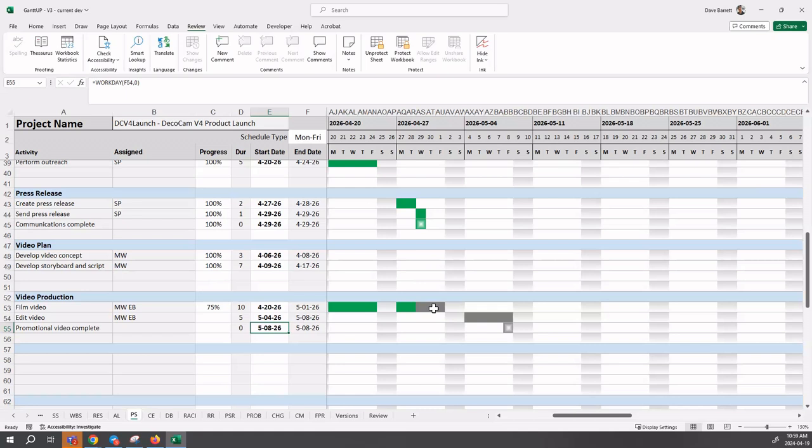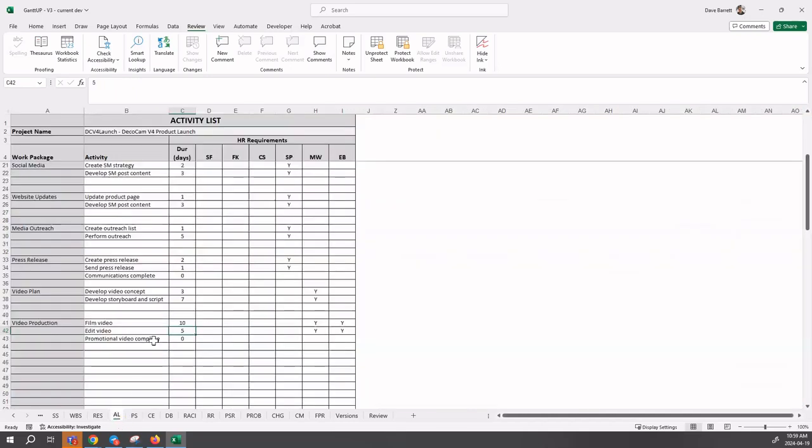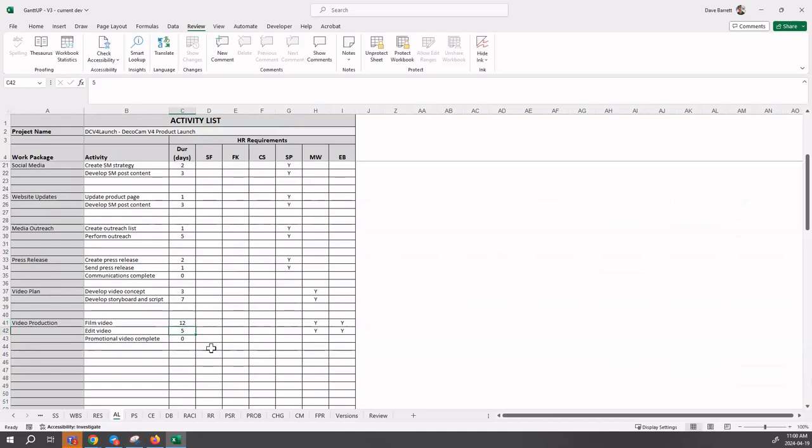It's only 75% and it doesn't sound like it'll be done today, or we would have reported 100%. In talking to the team, two more additional work days are required. We're going to increase the duration of film video to 12 days instead of 10.